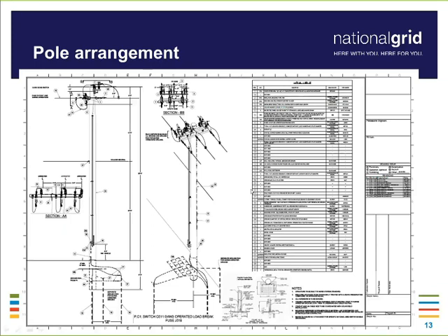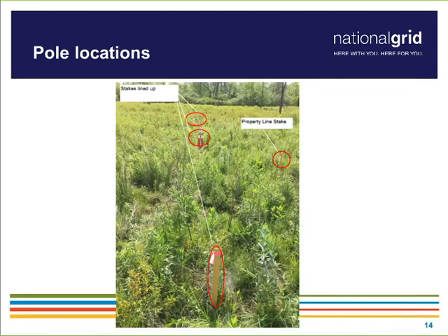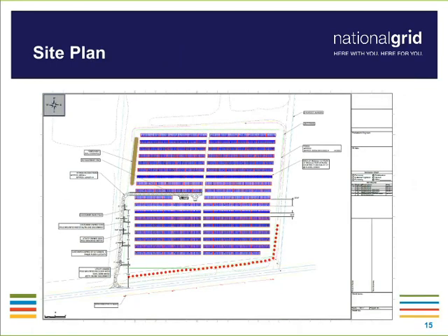Okay, great. Thanks, Chris. So again, that's just one piece of what's required to start the utility design and get to the final schedule. A little bit more detail than what was required for the initial site plan, but it starts to get us there and starts to give us an idea of what everything is going to look like. The other pieces, again, the stakes out in the field, if they have to be moved, they should be moved as soon as possible. And then, again, the final site plan, which was mostly put together after the initial site visit. So this one should be pretty much done.